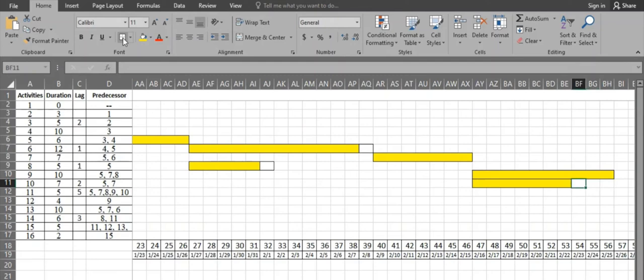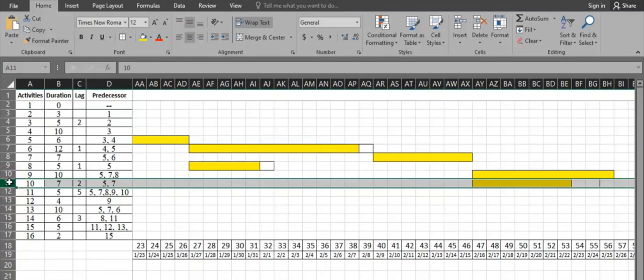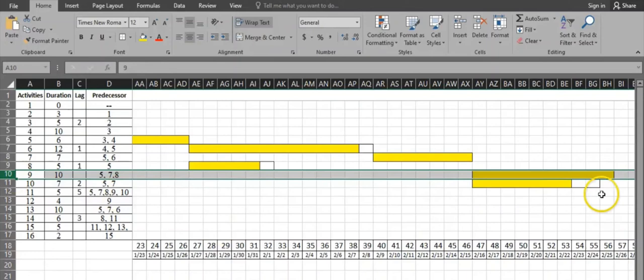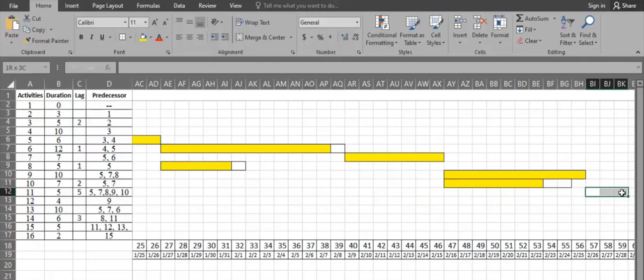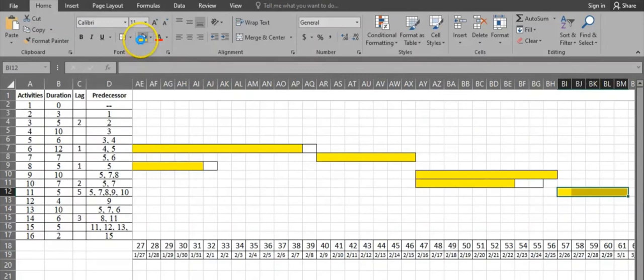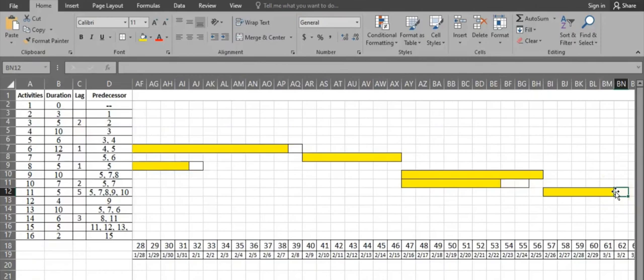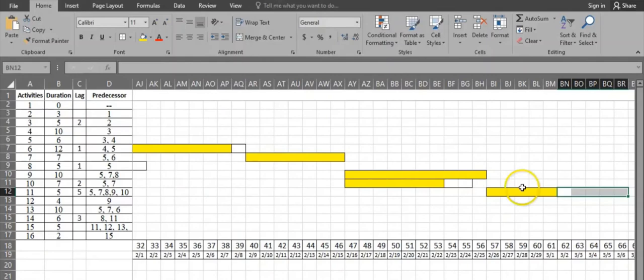Activity 11 has 5 predecessors. Considering all of them, activity 10 with its lag finishes on day 55 and activity 9 finishes on day 56 — the latest. So activity 11 starts from day 57. It has a duration of 5 days: 1, 2, 3, 4, 5, followed by a 5-day lag: 1, 2, 3, 4, 5.